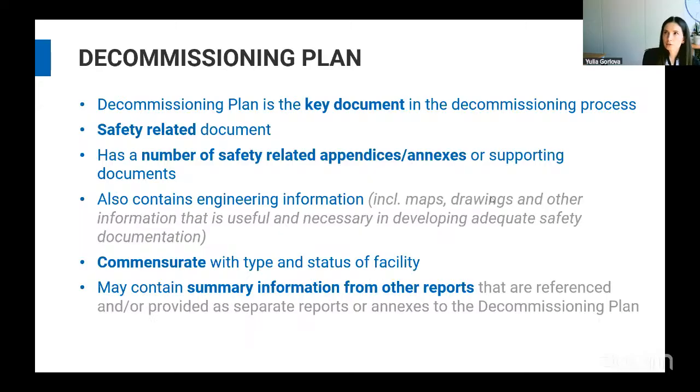But the level of detail of the decommissioning plan is not always the same. It starts from an initial plan that is very tentative and only has the big picture as we see it. Then, as we move through the phases of decommissioning, it gets updated, reaching the final decommissioning plan.